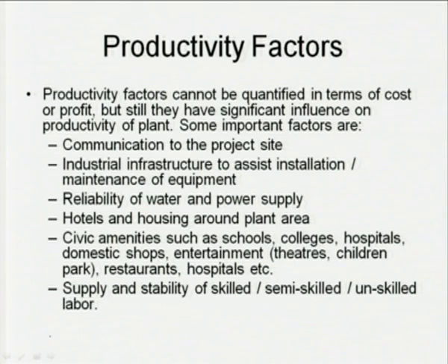By and large, people employed as skilled or semi-skilled persons in the project constitute about 20 to 25% of the workforce. During farming or harvesting season, these workers get transferred to the farms. So, absenteeism is high. Frequent social and village functions also trigger absenteeism. This affects the production. So, you have to have certain backup.